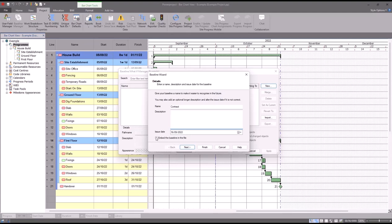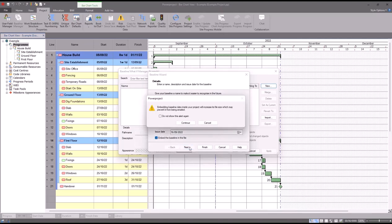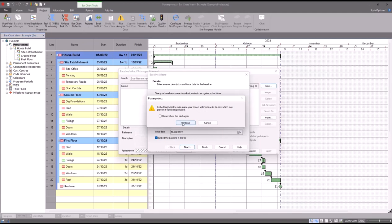When I click next, what it will do now is it will actually come up with a little warning kind of mirroring what I've just said here. So embedding the baseline data inside your project will increase its file size, which obviously only with a larger project, not so much a smaller one, may prevent it from being emailed. I'm okay with that, I'm going to click okay.